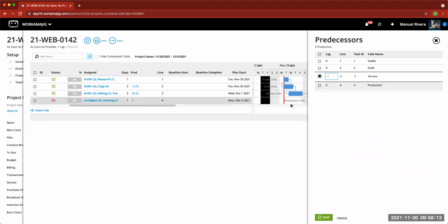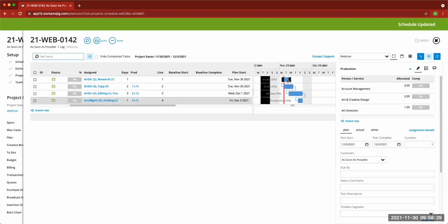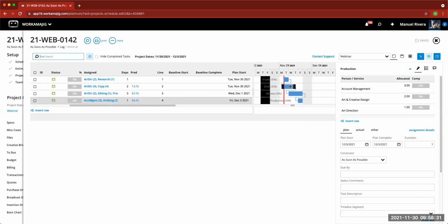So the idea is that the system is allowing you to go back with a space of time of 1 day, represented here in these blocks, so that when a milestone is completed on that first task, the second one, the third one, right, when the second one's done and so forth, can start as soon as the other one's completed, and not wait that extra day. So that's another thought. I don't know if this group runs into that, but again, we get that feedback that says, okay, what else can we do?